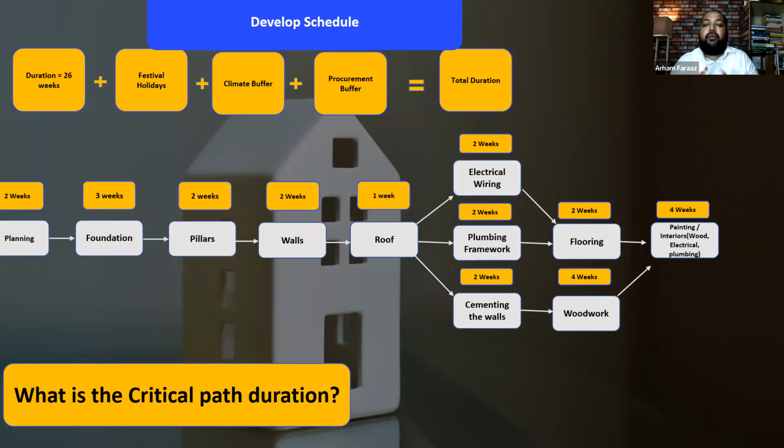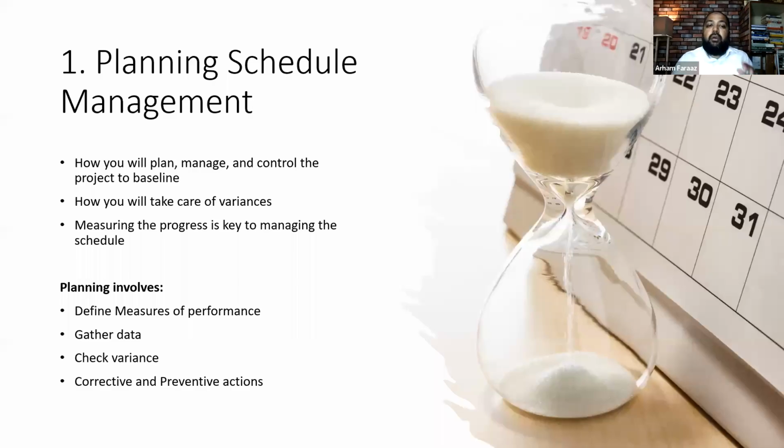Now if you have a fixed price project, you always want to do it in about 20 weeks and make the money of those 6 weeks as a margin. And if you're on a time and material project, you want to work on all the 26 weeks and bill the customer for all 26 weeks. Again, customers are going to check with you every week. It's not that you can just say, okay, we will try to drag the work. So that's important.